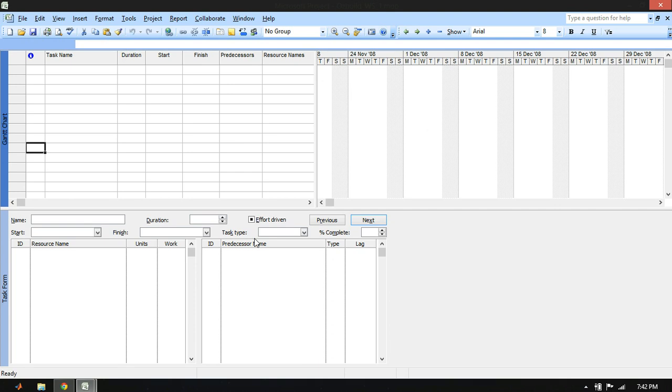Okay, now workshop 3, we have the background, which states the normal working week at Oz Builds is Monday to Friday, 8 hours per day, excluding public holidays. The installation staff works Monday to Saturday, 8 hours per day. So basically what we're going to do is go through and implement all of our holidays first.